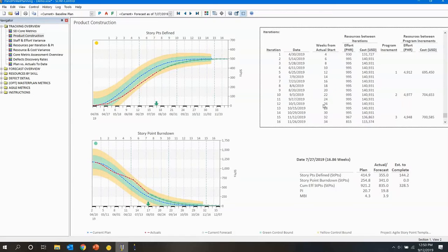What data do you need to capture history? So, like historical projects. That's Slim Data Manager, and it's actually surprisingly little information. Slim defines 4 high-level phases or groups of activities, if you will, like development and test. So first we would need to size your completed project in something like user stories or features. What is it that you delivered in terms of functionality? And QSM can help you do that. And we would also want to know the duration and calendar time and the effort. So with just sizing and duration and effort by phase at a high level, it's not that much information. And again, we're more than happy to help you do that.